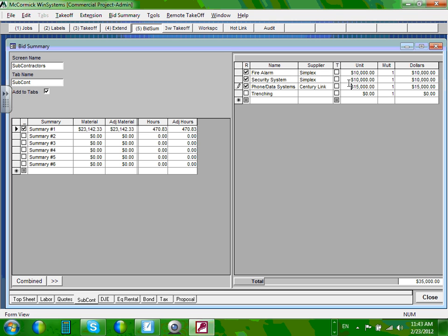Okay. Any contractor, guys, doesn't have to be those guys. Any contractor, you can put the name here, and you don't have to put a name, but it's easy. What do you do with the quotes? You're dealing with a bunch of low voltage guys, and they give you a quote. You might have to pick between 5, 6, the cheapest, or the most reliable guy. You might not be the cheapest, but I know I worked with you, and you are reliable. You are on time. So there's a lot of factors. Yes, sir.